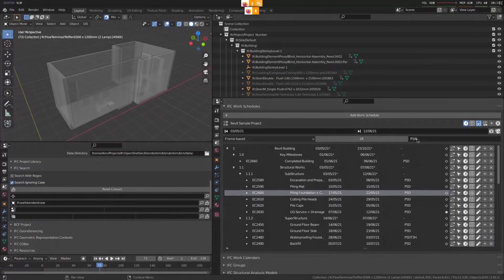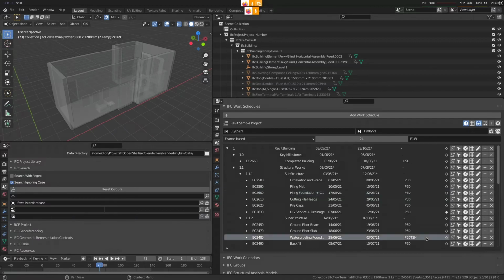And if it's a non-time unit, like a week or a day or a month or a year, you basically do 1W, which means 1 week. 1 week, 5 days is 1W5D. It's really easy. And then if you want to put time, you have to put T, and then you have 5 hours, 3 minutes, 2 seconds. But most of the time, everybody will just be using days, except for this one, because life happens.